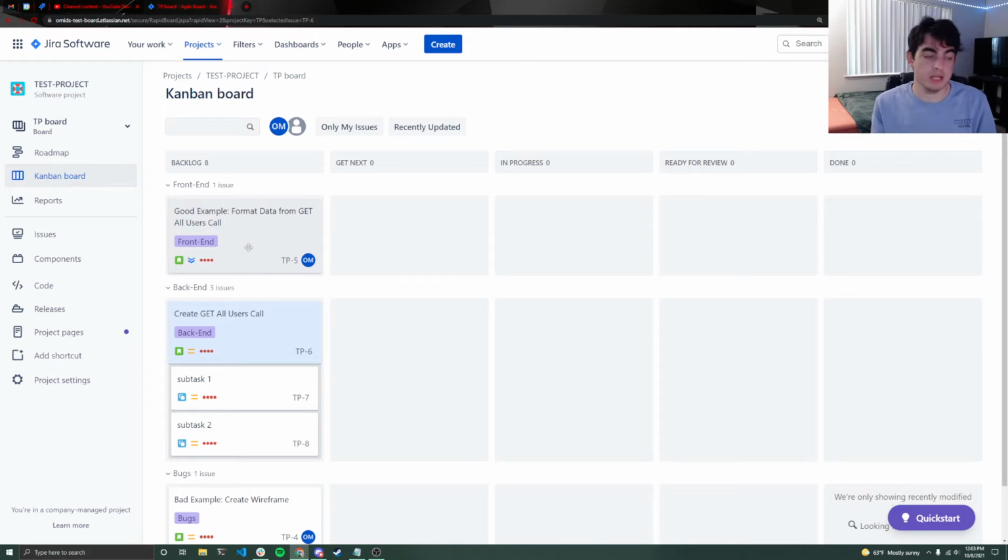I have to create some other API route that this one is dependent on. I have to create something to format my data to return it. I have to create something to also cleanse that data of any misspellings or typos. Okay, that's a lot of things. Just creating the get all users call is one thing, but all of those other 3 or 4 things around it really add the time up, and it's a lot. So if there's a lot of those, let's break that one task to get all users out into multiple subtasks.